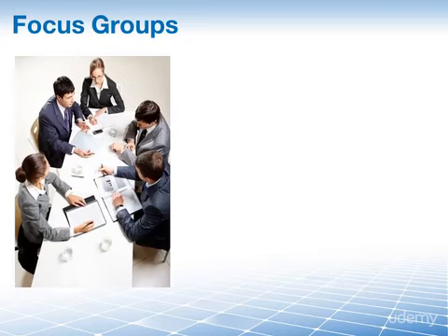A focus group, on the other hand, is a form of qualitative research in which a group of people are asked for their thoughts about a certain subject. And during the Collect Requirements process, a representative group of our stakeholders can be used as a focus group to define project requirements. There are a number of ways to set up a focus group, and these include a 2-way focus group. So that is when one focus group observes another focus group and then discusses the interactions and conclusions that they observe from the first group.